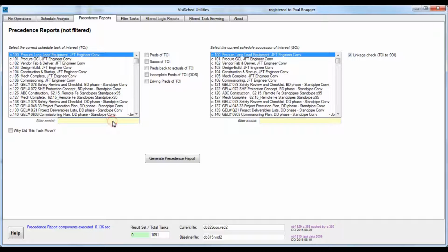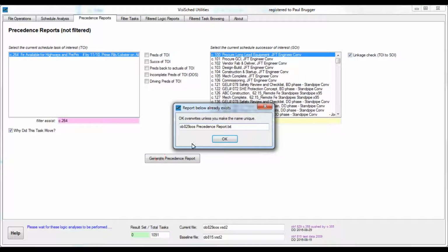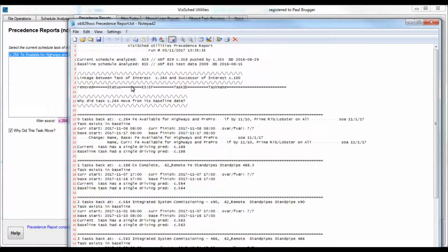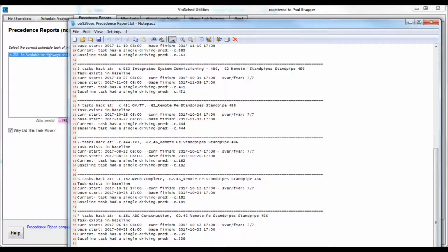I don't know about you, but at my site, the project director, the owner, will not hesitate to ask, why did that milestone move? You can now answer in real time. There it is. The earliest contributing factor to this negative variance would be the start on or after constraint applied 8 tasks back. Charm the director by reading down the path like a drone to express your general ennui with having to continually explain how other people are failing to perform. Why did it move is a powerful feature for seeing the cause of delays. Claims analysts, are you getting this?